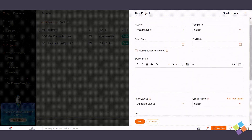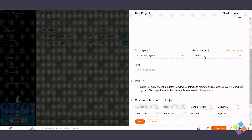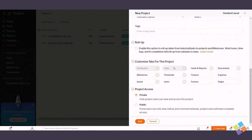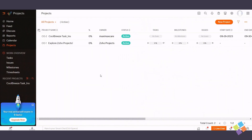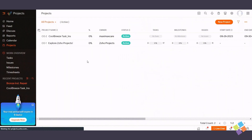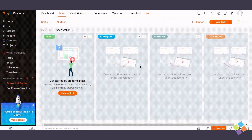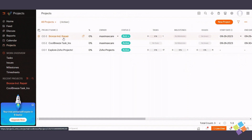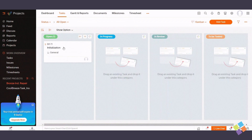Now let's talk about administrators, who manage user access and project settings. To assign someone as an administrator, navigate to project tasks, select a task, and choose the owner with administrator access.